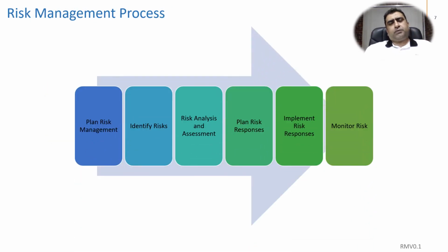So the risk management process has these components. It includes planning of the risk management process, identifying risks, risk analysis and assessment, planning of risk responses, implementing of the risk responses, and in the end, monitoring the risks.